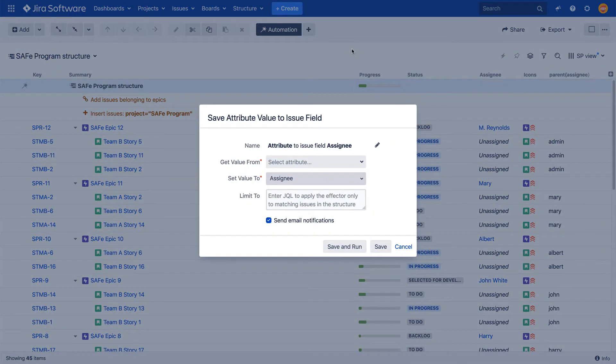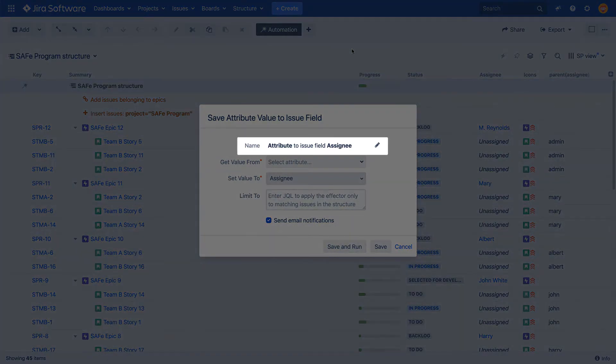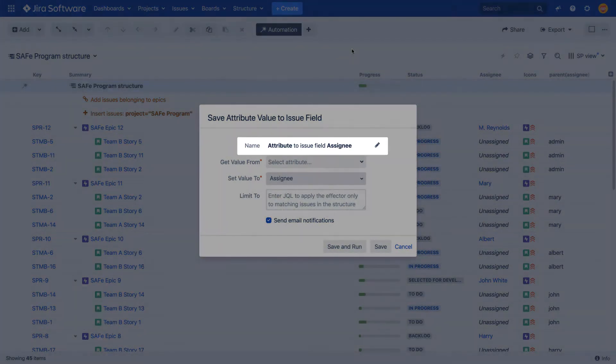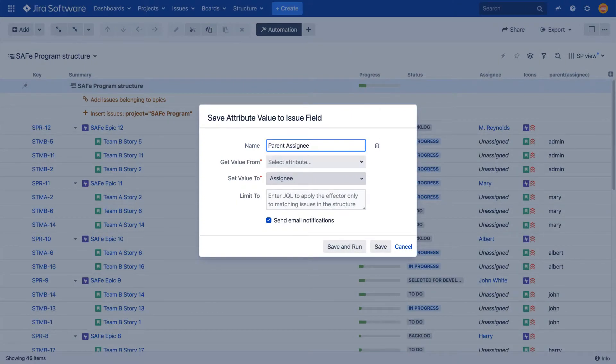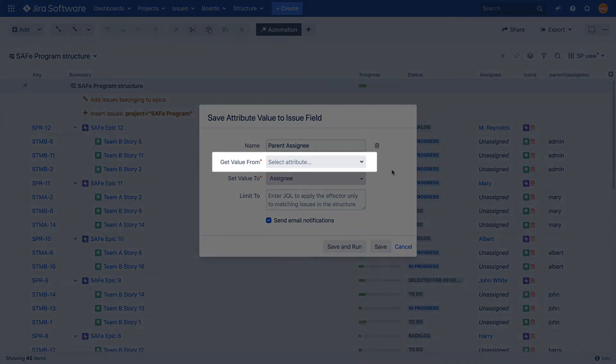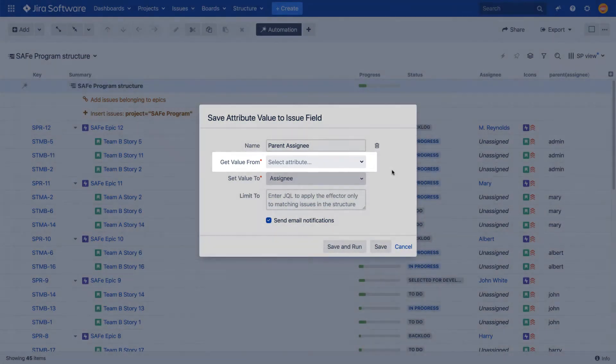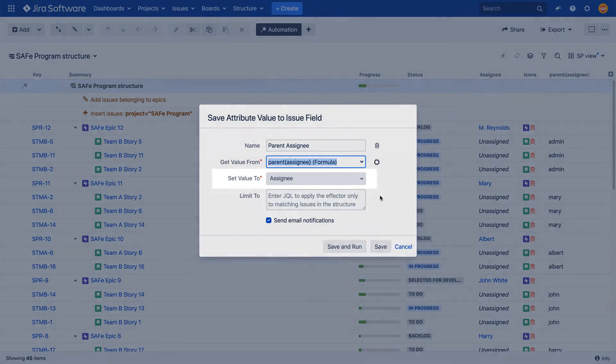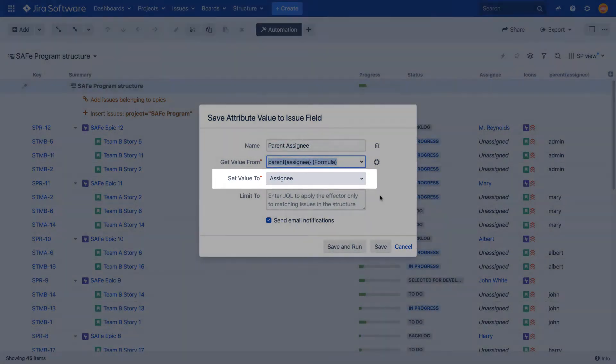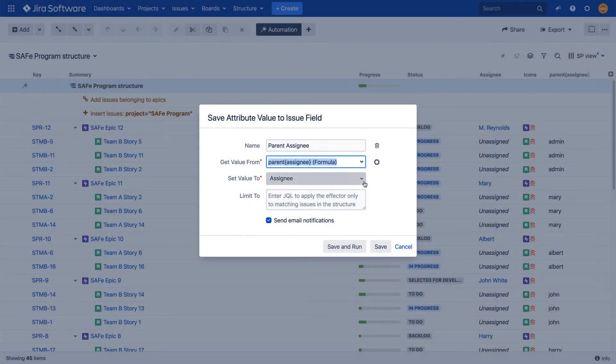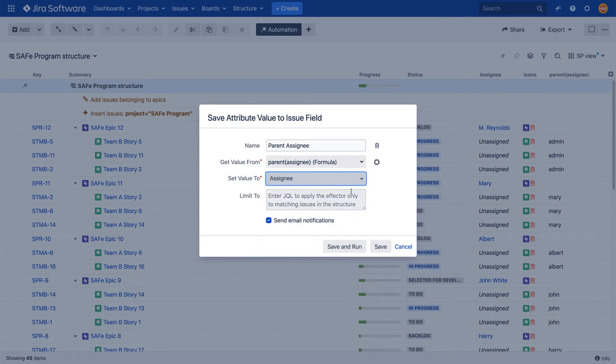Then configure the following fields in the effector dialog: The name of the effector. By default, the name is given based on the selected Jira field, but you can change it. A column from which the attribute will be taken. In this case, that's our formula column. A Jira field to which the attribute will be written. In this case, that's the assignee field.